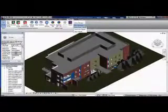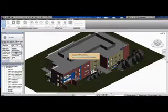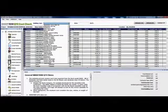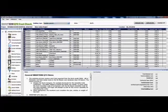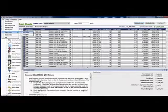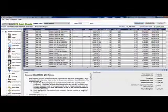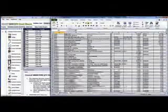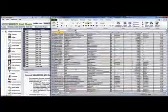The model can take the owner right from the hospital room discussions to spreadsheet consequences for cost, availability, procurement, and logistics for just-in-time delivery of the product. Here you see the building's cost being instantly estimated by the RS Means database, based on the quantity takeoff of the materials and objects contained within the model. Virtualization has taken the mystery out of construction.